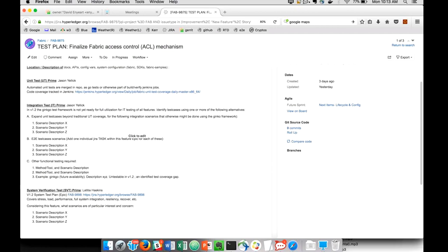Do you think it's worth talking about dates, given when we need stuff done by? Well, the ideal situation was that we are done with development at the end of April, and we dedicate May to tests. I would say the first 2 weeks of May we'd be populating the test plans and test cases. As we know, some of the development items are still trying to close down this week, and so that would push us to next week probably to finalize these test plans. I don't have the calendar in front of me, but I think end of next week would be a good target for the test plan and the test case population. All right. So have JIRA populated with your plan and what you plan to test end to end. Right. Okay.